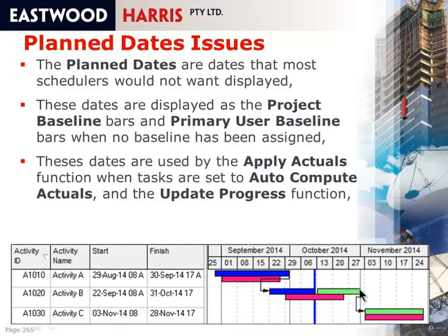And this is how other products like Microsoft Project, SureTrack and P3 work. But with P6, if you use the update progress function, it'll change the actual start to the planned dates, and it will change the early finish or actual finish of this activity, depending on how far you moved it forward, to the planned date. I strongly recommend that you never use the update progress function if you have a program with progress against it, because it may change your actual dates and your early finish without you realizing it.